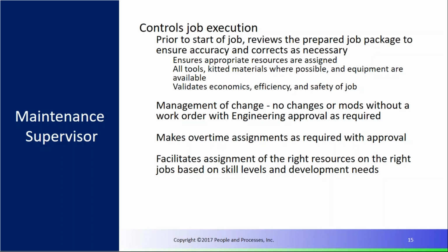And so then what should be happening is that supervisor should be assigning the work by day in the morning meeting, or whatever, the start of the shift meeting, saying, hey, everybody, this is what I need you to do. And then they need to understand where they're at on the schedule, because if you wait till the end of the week, then it's too late to make corrections in many cases. So every day you hand out work, every day you get back work, and you know the current status. That way you can effectively manage it to complete the schedule to get that 400 hours worth of work done this week.